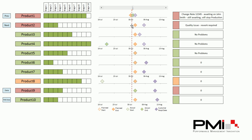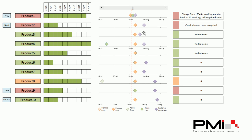In this example we can see that product 2 has got a planned end date of the 2nd of August, so we've got a couple of days to go before it's due to end, even though the customer requires it a few days later, so there's a bit of a cushion. But we can see we've got two days left and quite a few stages left to finish, and it's flagged red — there's a big quality issue and parts have probably gone back to be reworked at the supplier. This is the sort of thing your production manager or project manager would need to tackle quickly to bring yourself back in line with the times set at the start of the project.